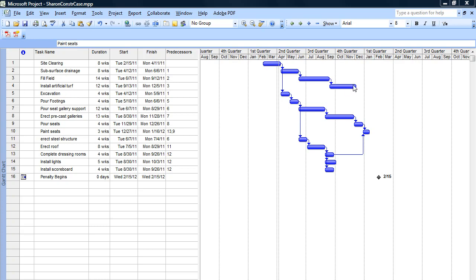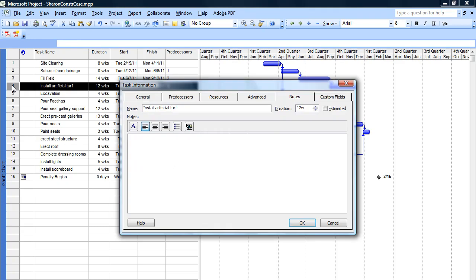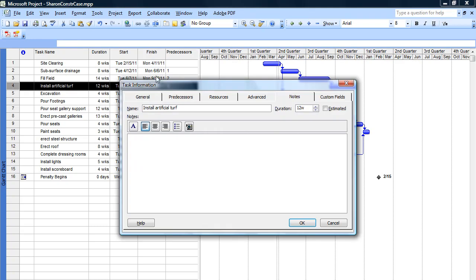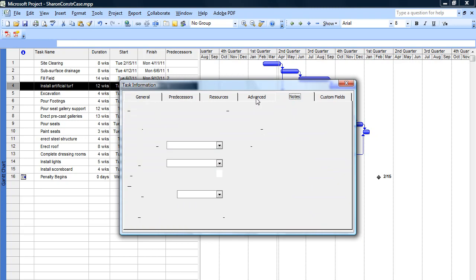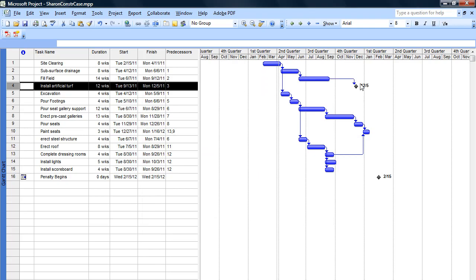If I want to put a milestone at the completion of this series, there are two ways. The first way is I could double-click on this and open up the advanced menu, and at the bottom I see the opportunity to mark this task as a milestone. So we can identify a critical task within the project and just tag it as a milestone. When I do that, notice that it changes shapes.